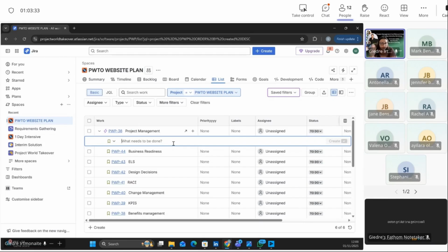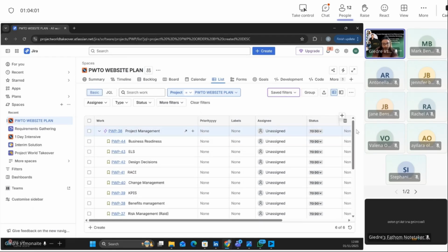So we could say something like, has the website been designed? Has the website been approved? Is there a login page? Is there a contact us page? Are there options for you to sign up to coaching? It basically becomes a checklist that you go through, and different people are responsible for it, to say, okay, right, we're ready to go live. That's what business readiness basically means. How ready is the business for the project to go live? So we'll also cover that as well, which I think will be really fun.